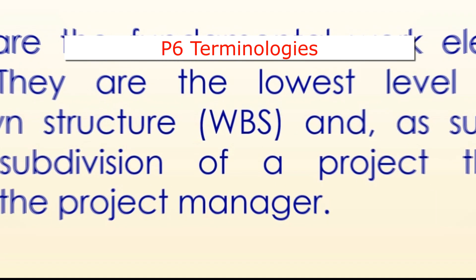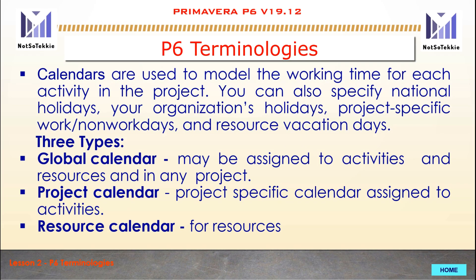Calendars are used to model the working time for each activity in the project. You can also specify national holidays, your organization's holidays, project-specific work, non-work days, and vacation days. There are three types of calendars: the Global Calendar, the Project Calendar, and the Resource Calendar. The Global Calendar may be assigned to activities in any project. The Project Calendar is specific to a project. For resources with special skills, you can assign a Resource Calendar.